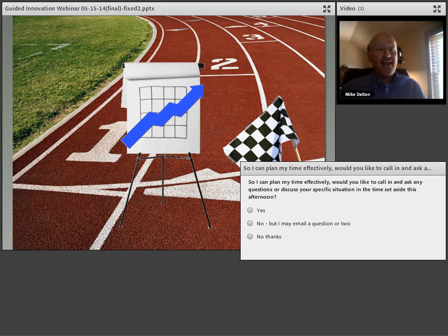What starts happening is, the projects all start moving, and you divide the resources across them. They all start moving a little bit slowly, and that's an exercise that really gives the leadership team a view: they watch period after period as the cycle time starts to increase, and in about a year and a half simulation, the time for a typical project that might take 6 months increases to something like a year and a half to 2 years. I mean, it's really very dramatic.